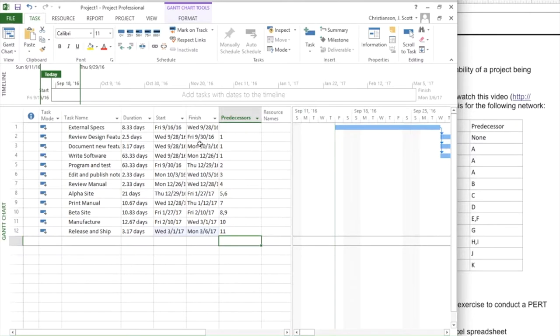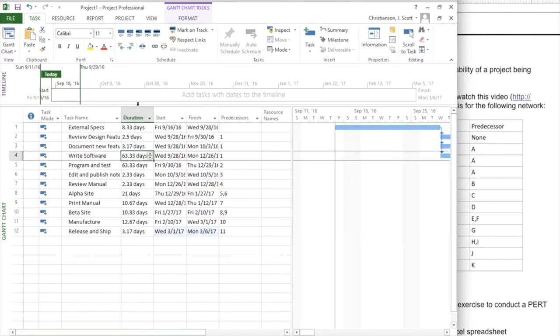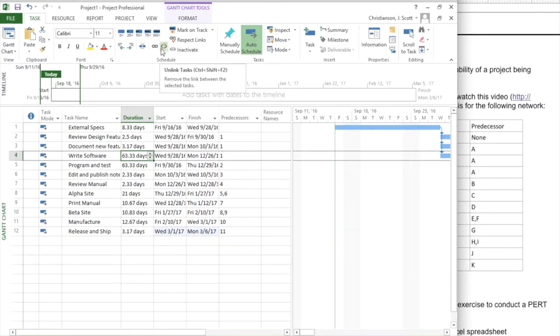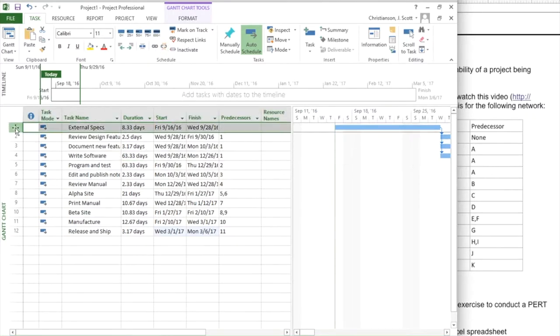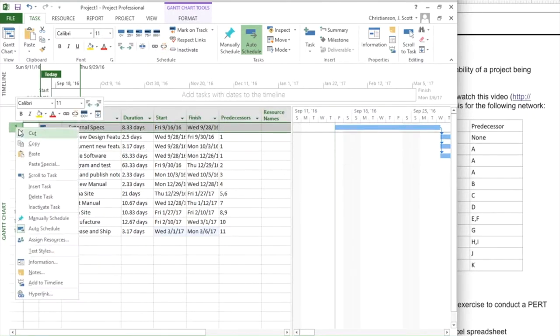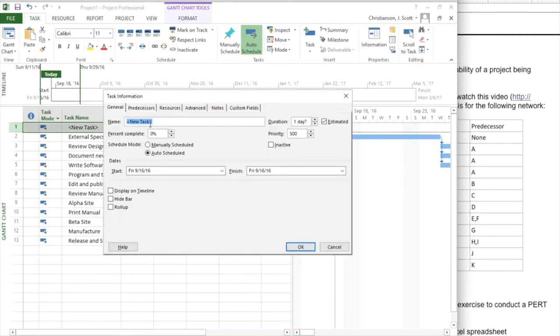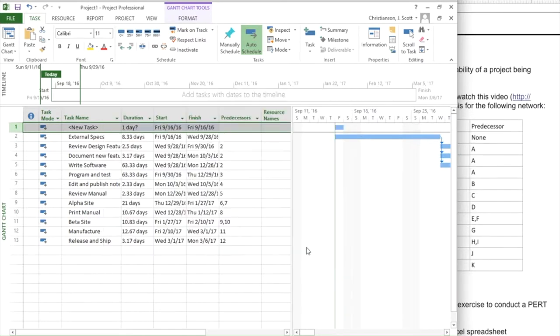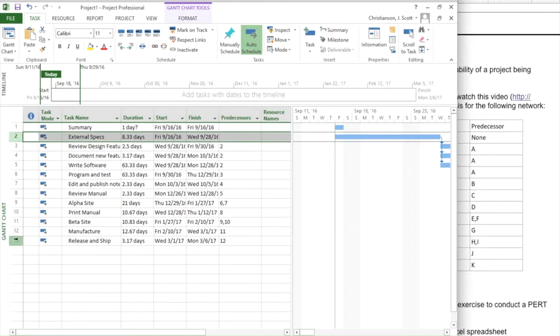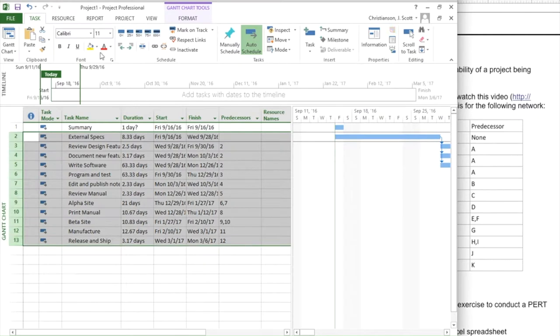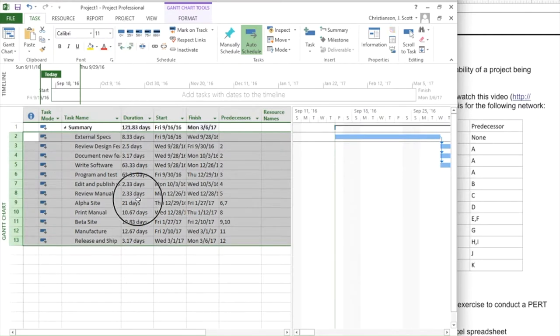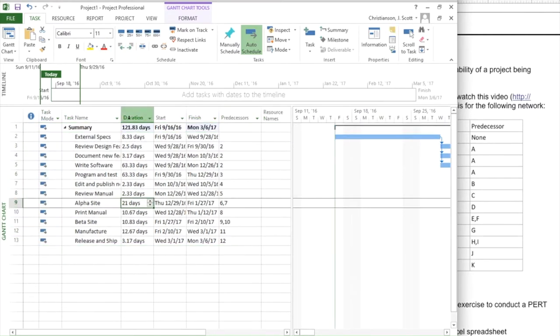Now what I want to do here is gather some information about my project. I have the duration, I have the predecessor information. So now, for example, I could put in a summary task. If I insert a task above here that says summary and indent all the items underneath that, I can see that this is approximately 122 days.